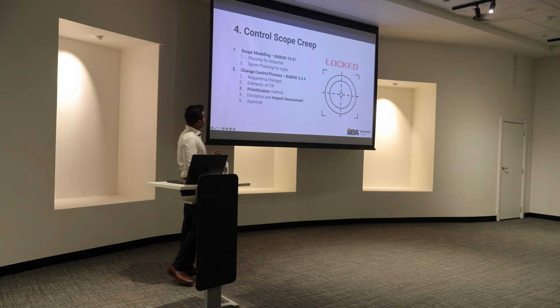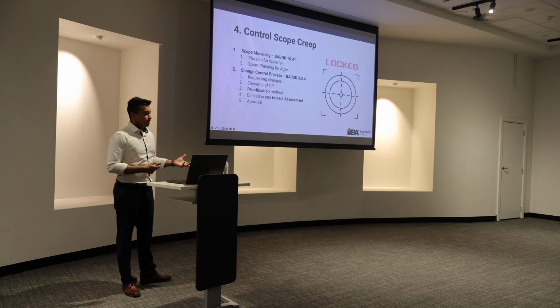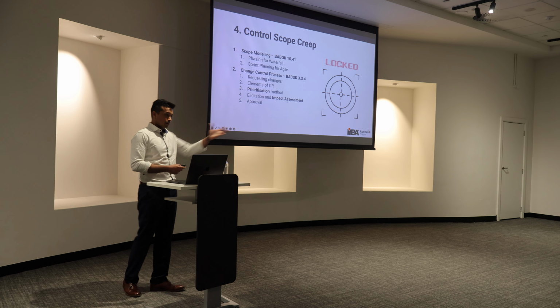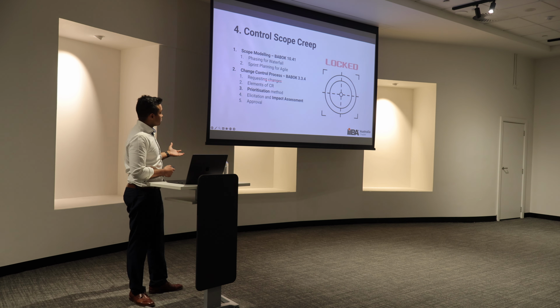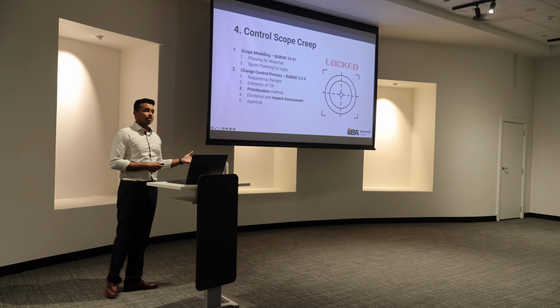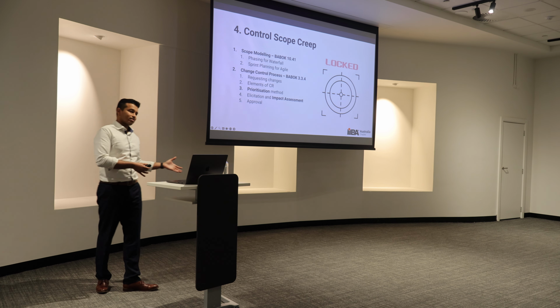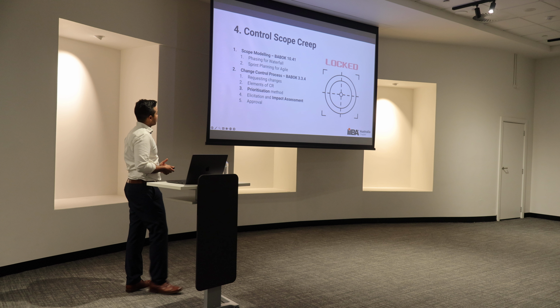Scope creep, favorite one. Several ways you can go about it, but you don't have to complicate it too much either. With the whole scope model, I don't do that. I use phases for waterfall projects. I split the work into phases, at least from my project management days, and then run what is called sprint planning for agile projects. That way, scope is controlled, we know what the capacity of the team is, and we just get done what we can get done in that part.